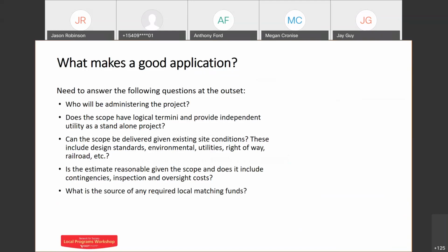And do you have any matching funds? Have you budgeted for any match that's required? You're successful in getting grant applications and you're successful in getting that funding, and whoops, we never really thought we were going to get this money. Now what do we do? We actually have to find the local match for that. So just planning ahead, looking at that 2-year funding cycle, knowing when things are going to come on board and being approved should help you backtrack and work backwards for your budgeting cycles to make sure you've accounted for the match that may be required.